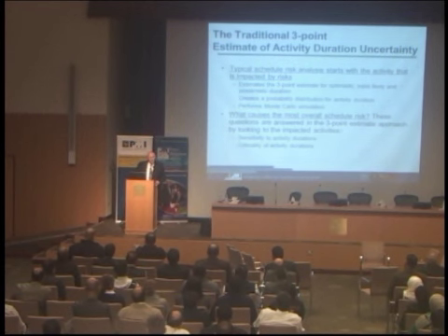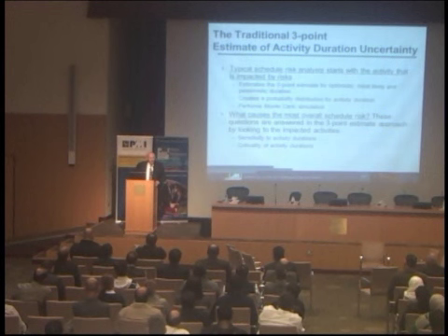Secondly, comes the question of, okay, if time is money, doesn't time risk have something to do with money risk? How can you estimate cost risk without taking account of schedule risk? Because schedule risk causes some of your resources to work longer hours, many more days, months sometimes, and they're going to be paid. Now, if you've got a fixed price contract in this environment here in the Middle East, probably the people who pay it are the contractors.